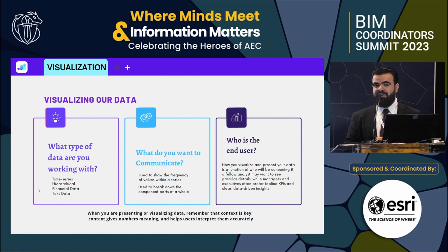I'm going to tell you a very good story I had with one of the clients. The objective was very straightforward. He said, I need to integrate the project management with the 3D models. For someone familiar with this process, it's very straightforward: you just standardize the naming convention between the 3D model and the planning, or the time schedule, and the project team should use the same naming convention for their activity IDs and this kind of stuff.